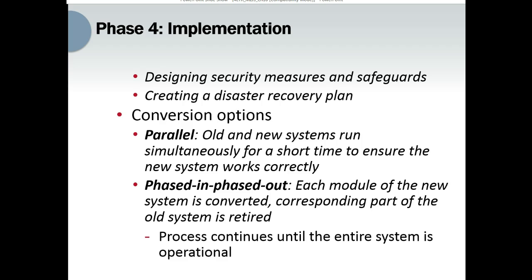In this type of conversion, each module of a new system is converted, and the corresponding part of the older system is not going to be used and is going to be retired. The process continues until the entire system is operational. Again, this type of conversion might not be suitable in all situations. Maybe it could be effective in accounting and finance systems.